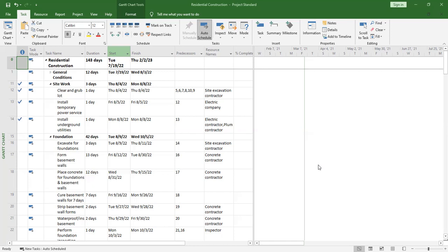Remember, let's look at the whole project. If the project is supposed to get done on 1st June and you incur time overruns, you know that you're going to be charged liquidated damages every single day. So we want to understand if you have time overruns for a specific task, that the task was supposed to take 5 days, but now it has taken 7 days.